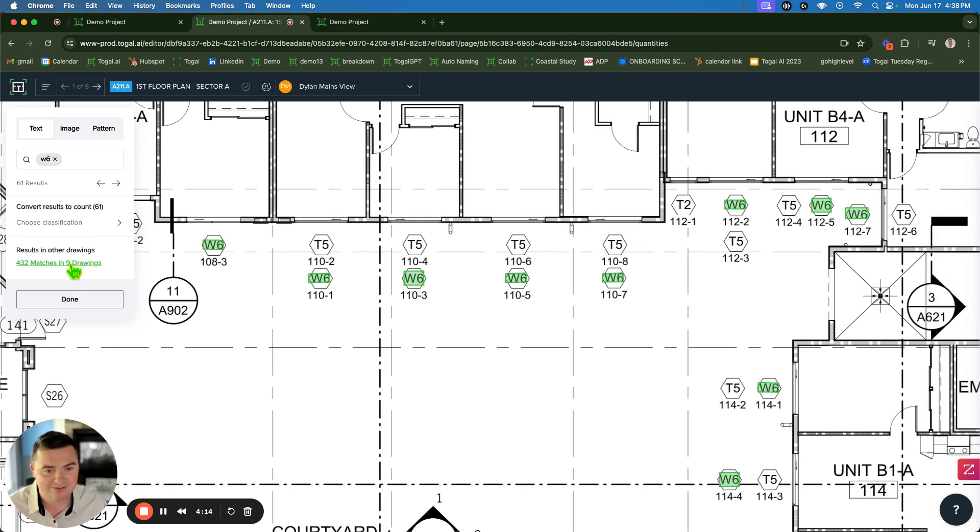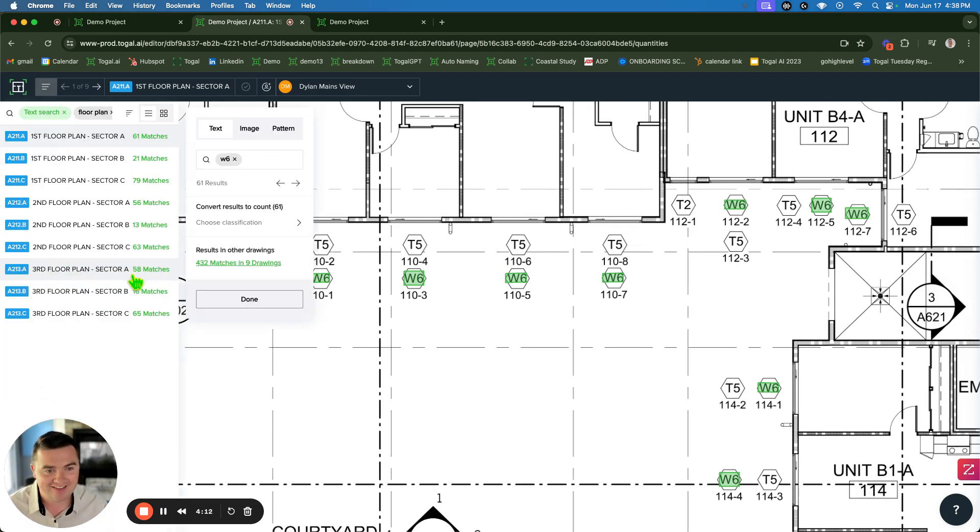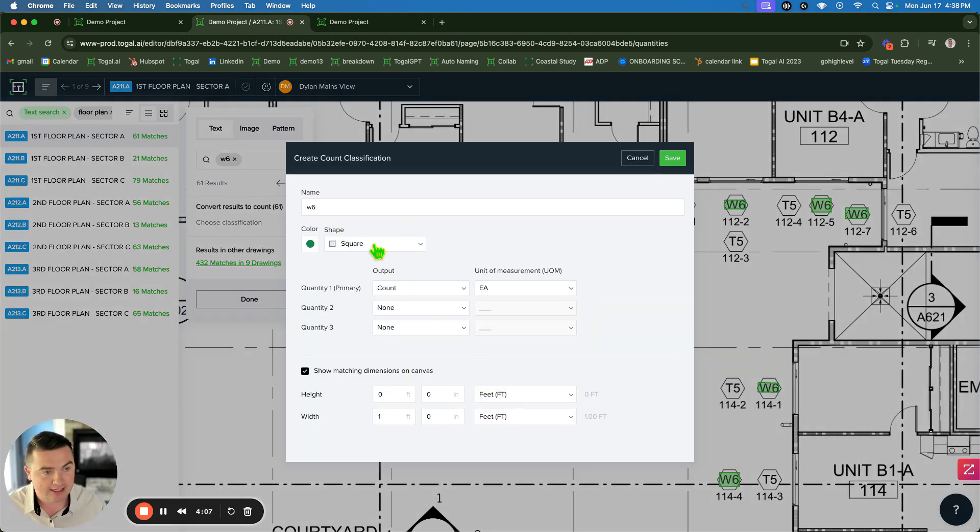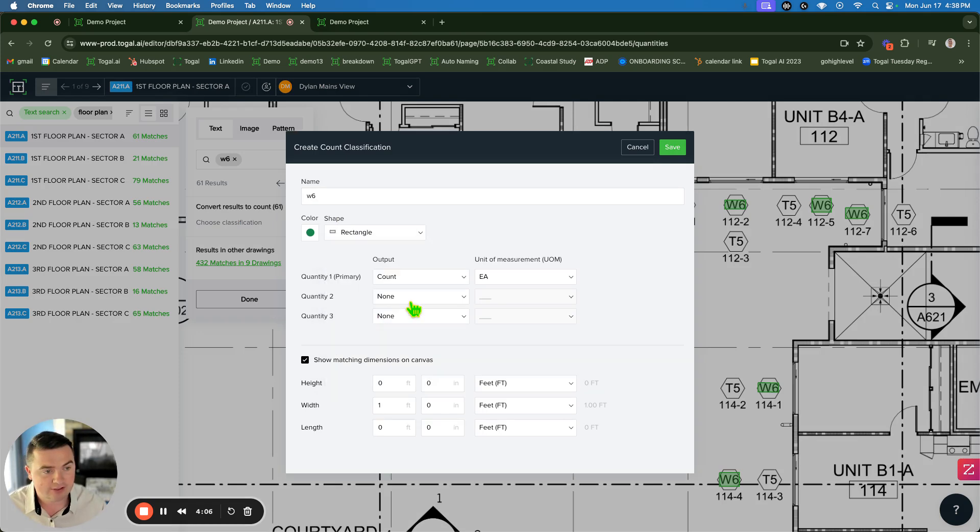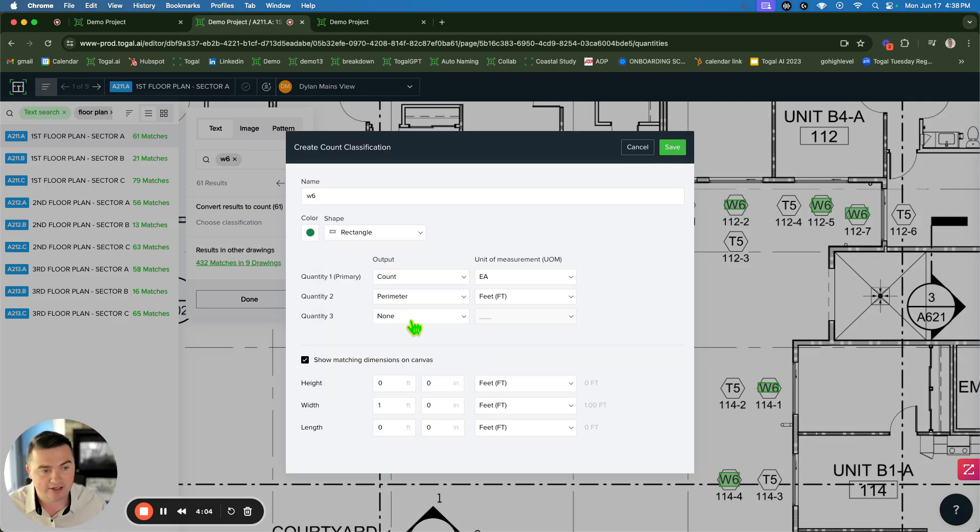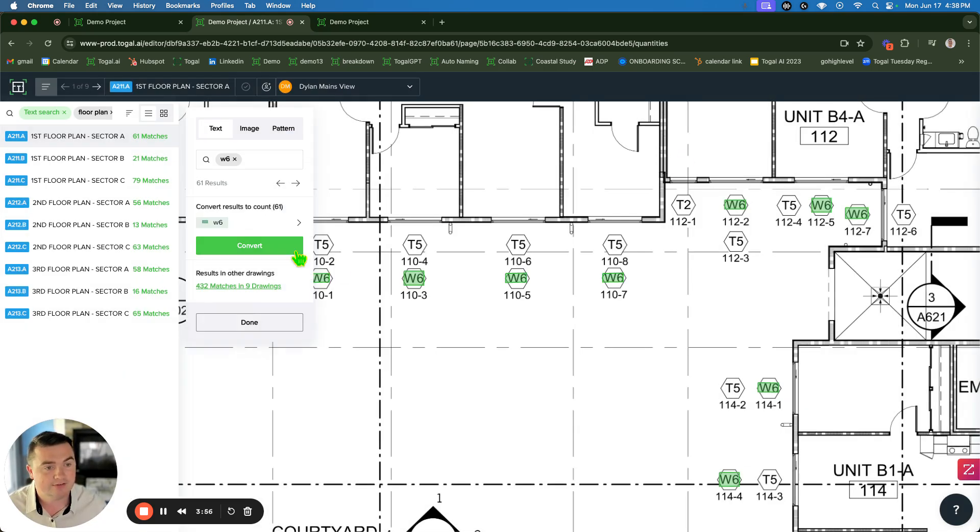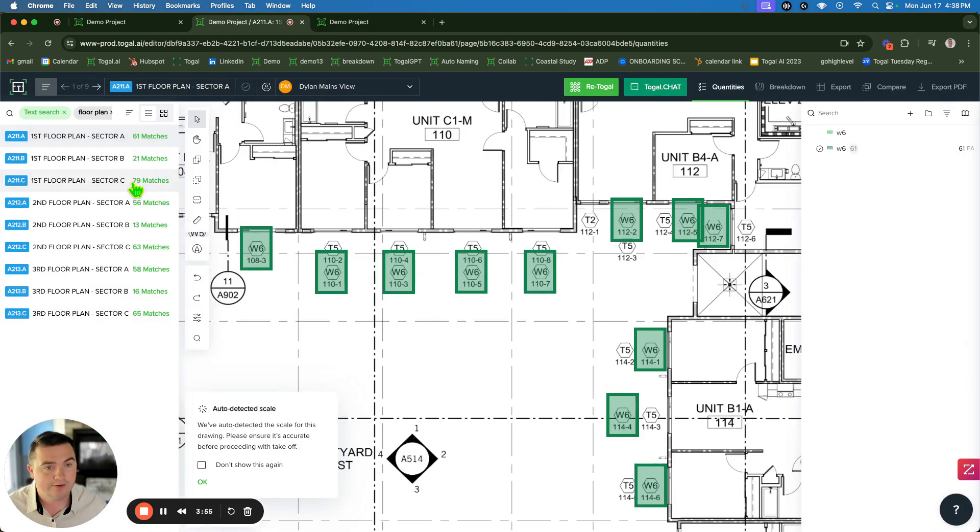432, close enough, right? And then from there I can just convert these and put them in Excel, type in W6 window here. That's what I can label it, put it in rectangle mode. I can get the perimeter, get the area, the perimeter for my trim, the area to subtract out of my elevation, five foot by seven foot. Click save, click convert. All those are done.